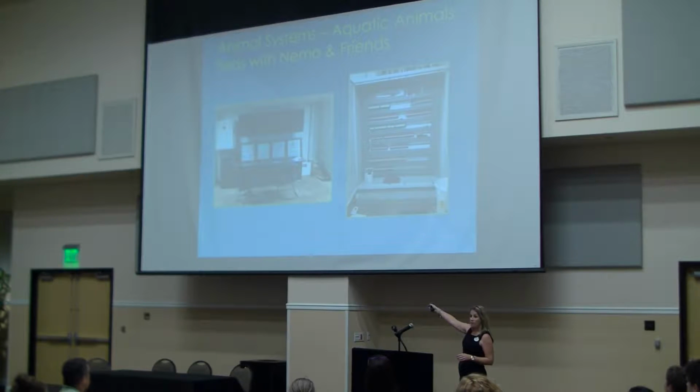Condensed down to that one piece of equipment, probably a little bit wider than this table here, and it's all there. And all the brains got moved into another room as well. There's probably 500 plus points. The wires, it looked like this cabinet just vomited wires. It was everywhere. It was such a mess. It was all summer. All summer it took us to do this. 2.2 million between this and the motor control center being replaced. And now it's back up and running.